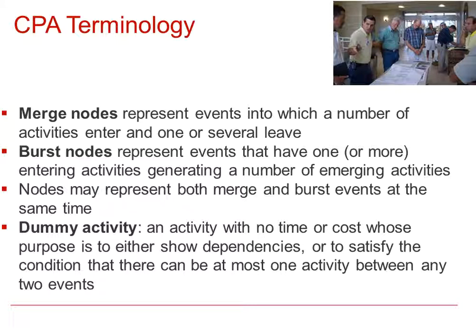A dummy activity is one with no time or cost, whose purpose is either to show dependencies or to satisfy the condition that there can be at most one activity between any two events. We'll look at dummy activities in more detail later on.